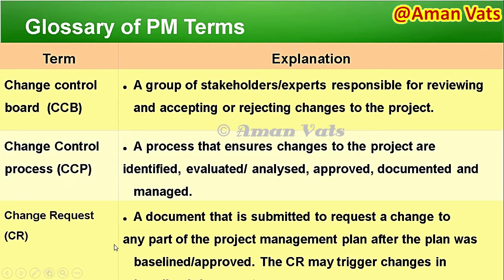Change request: a document that is submitted to request a change to any part of the project management plan. Let me tell you, this is after baseline. I used the term baseline previously, so this is after baselining. A document submitted to request a change to any part of the project management plan after the plan was baselined and approved.